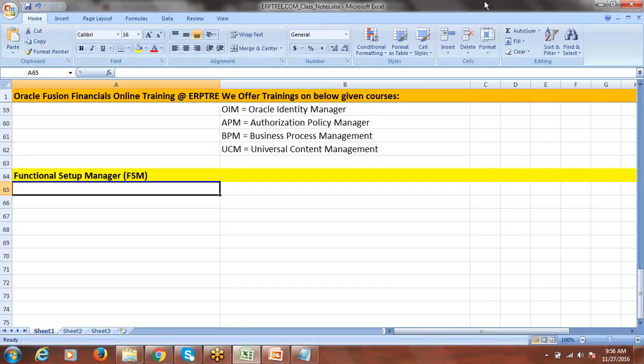There is no option in EBS to manage which project you are doing, who the manager is, who the team members are, which team member is responsible for which activity, who is going to do a particular configuration, what the progress of the configuration is, and how much percentage of the project is completed. This sort of information you cannot track within the system. You can track it outside the system, but that tracking is not online; it's offline. Somebody completes a task and has to update the manager, who may update offline spreadsheets or an offline dashboard.